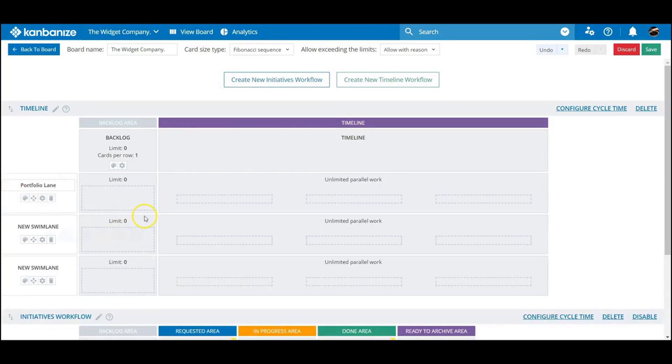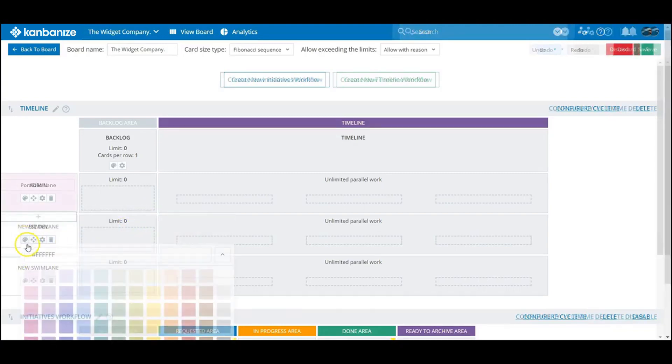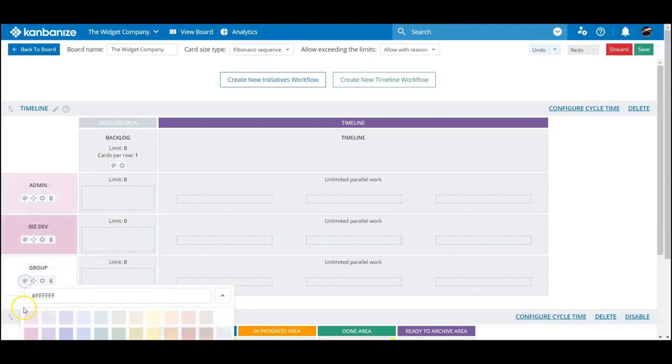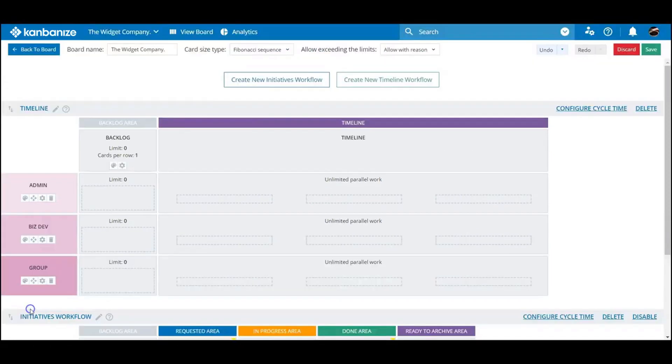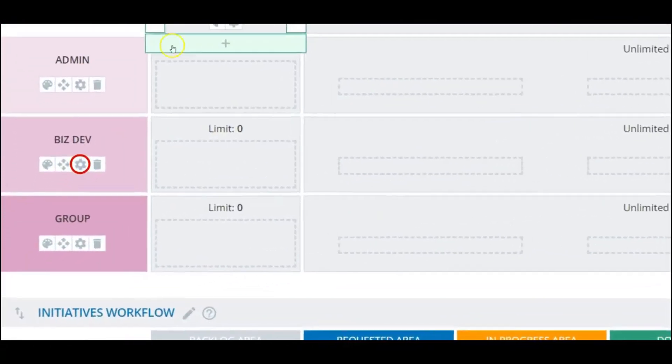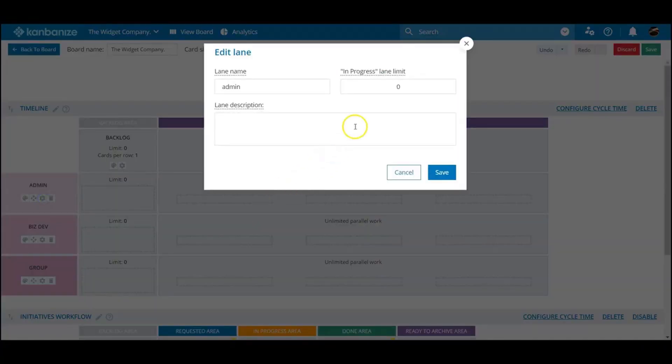Multiple timelines can be run concurrently in the same swim lanes, although it is wise to apply an in-progress limit to keep things realistic. Click Lane Settings and set a number you feel comfortable with for each swim lane.